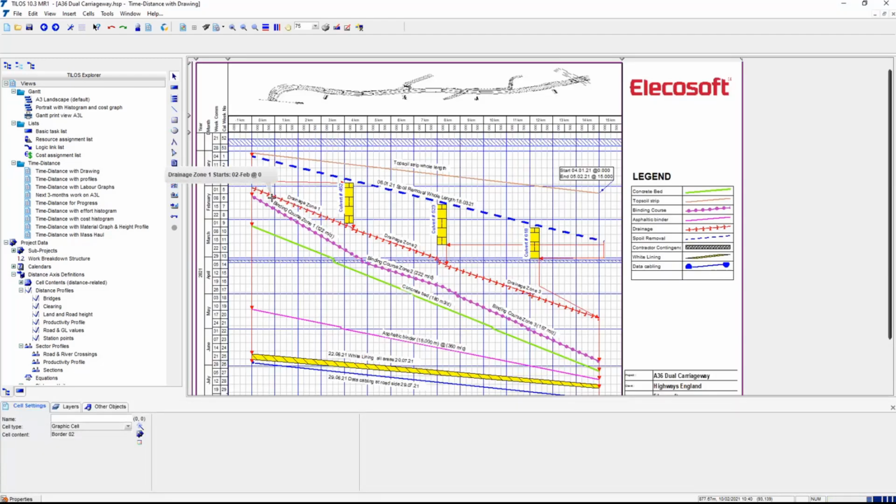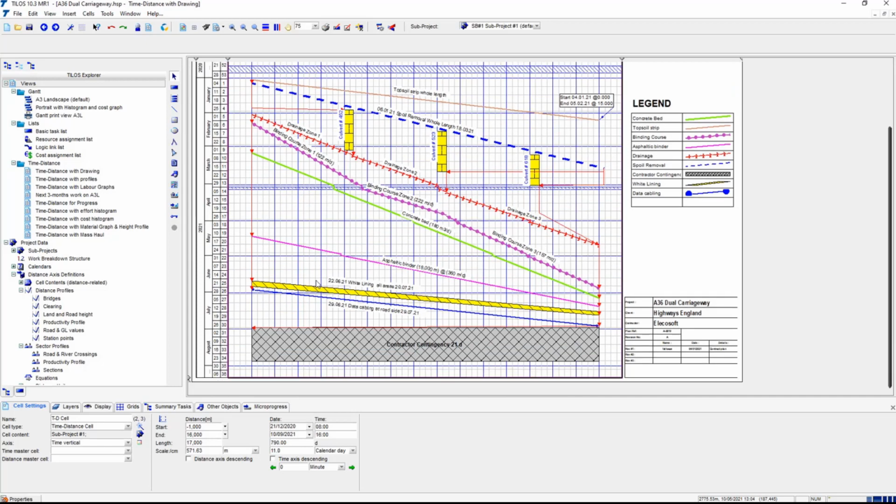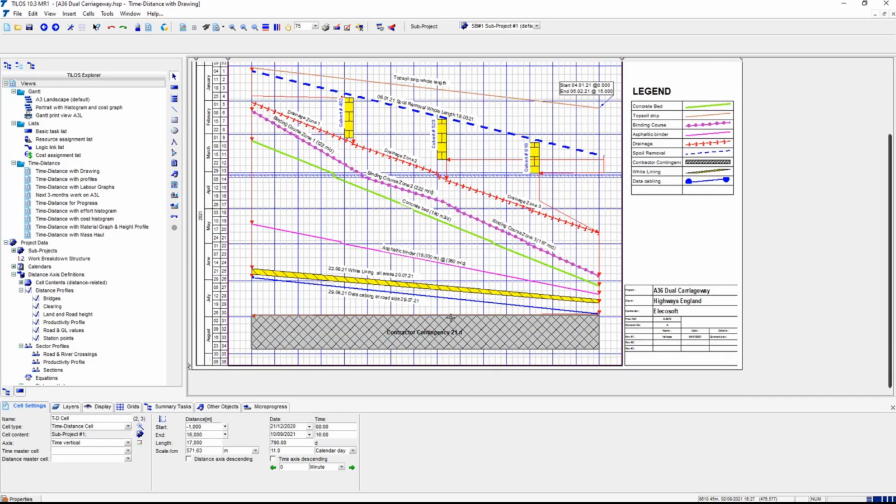So this is the same thing, but just developed a bit further. This is what we cover in a standard training course. There's my legend to show you what these different things represent, and it's just developed a bit further. And we've got additional activity types like hammocks and things you'd never seen in P6 called buffers, and intermediate tasks you used to have in P3 but don't have in P6 anymore.